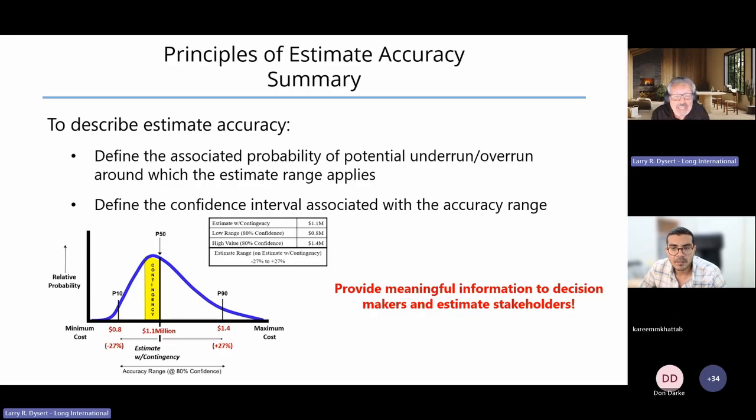And certainly by class 3, when we have final approved equipment lists, final approved plot plans and general arrangement drawings, and final approved P&IDs, those define the scope of the project. It's much more detailed and granular than an 80,000 barrel per day facility.